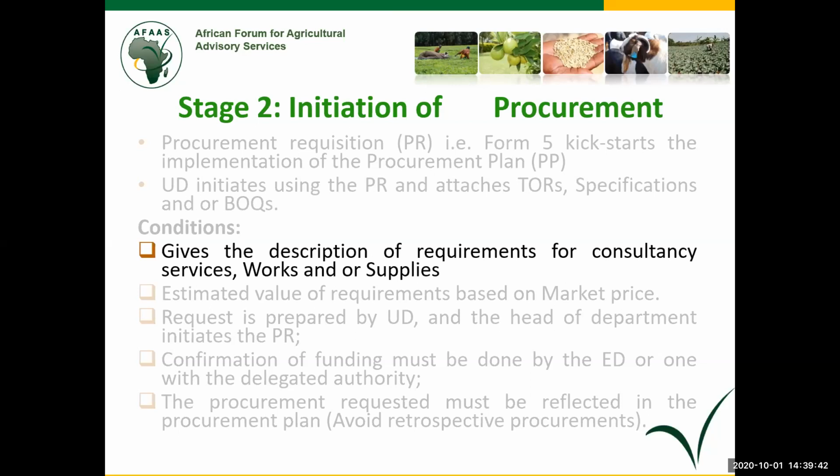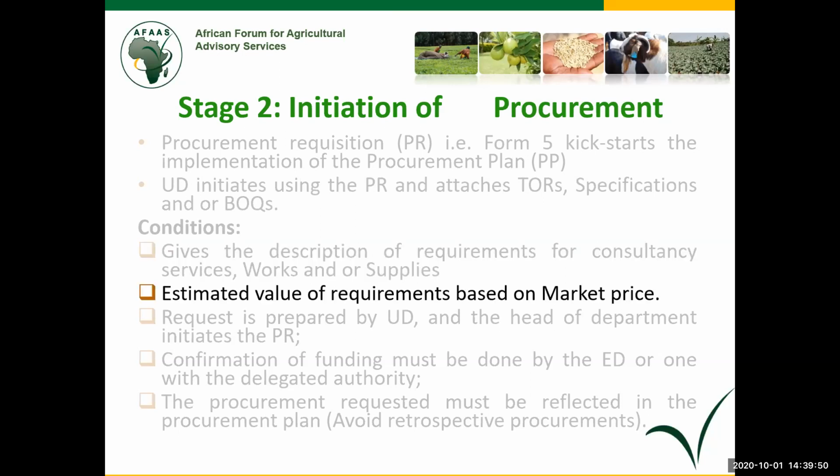This requisition gives a description of the requirement in terms of a consultancy service or supplies. It brings out at one point the estimated value of the requirement, and I'm advising that this should always be based on the market price. You try to scan the market and be able to come up with an appropriate price.